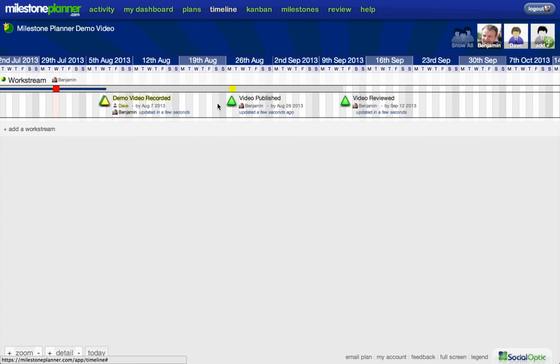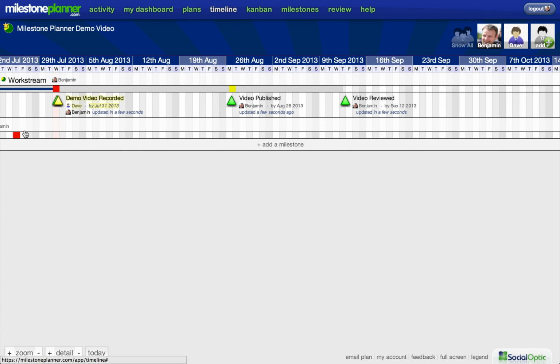If you want to adjust your plan at any point, it's simple. Just click on the milestone and drag it to its new date. As you get more milestones in the project, you may want to organise them. That's where work streams come in. They enable you to group milestones.